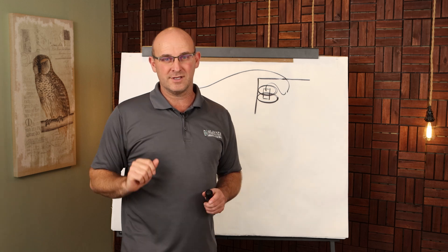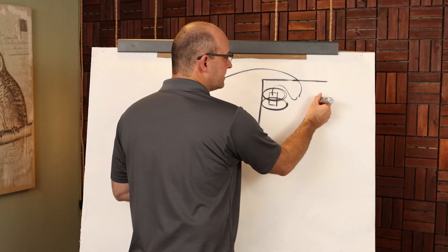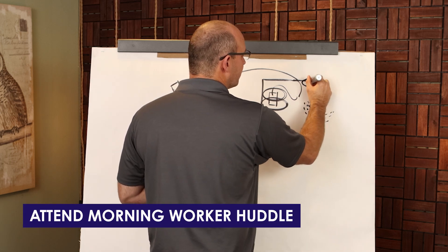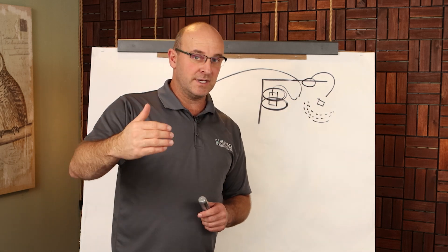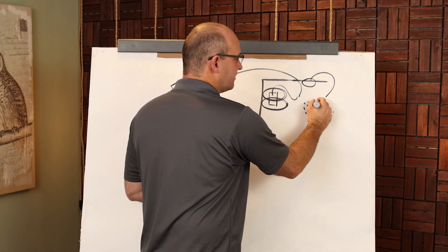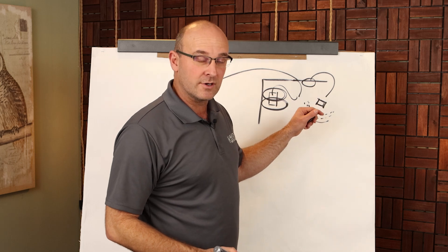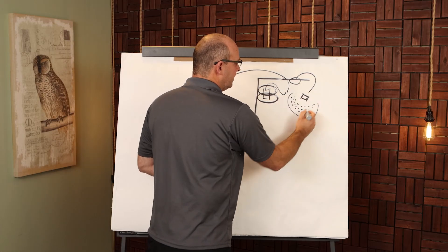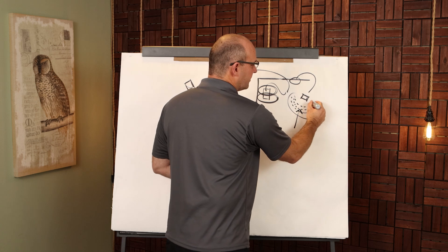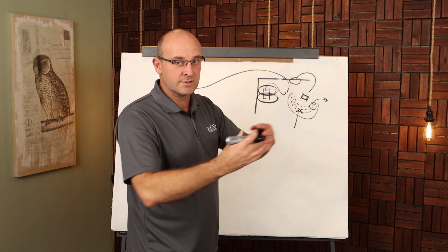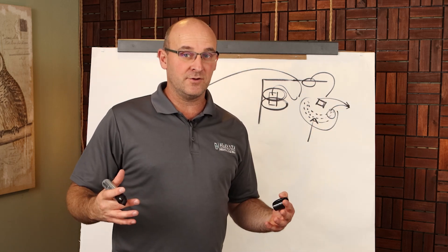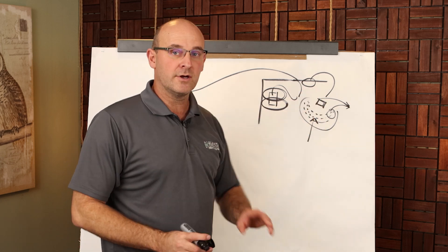Lift drawings and your layout and control planning are wonderful things to do before the day starts. After that you will on a project site that's being run in a lean way come out here to the morning worker huddle. This is where all the workers gather from the parking lot to come get the plan for the day, to speak up, to get shout outs and to align. As a field engineer you will be supporting the superintendent or assistant superintendents or you might be actually delivering the morning worker huddle yourself if they're training you. One of the things that a field engineer will do is if they're working with a crew and that crew after the morning worker huddle goes and huddles together, that field engineer might pace over there and connect with them and say hey this is what I'm working on today, just want to see if you have any other requirements. Attending that morning worker huddle is key.